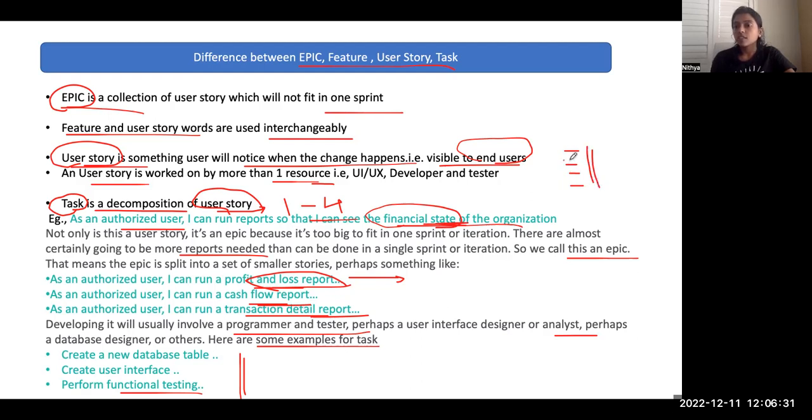We will discuss the lessons learned in the sprint retrospective meeting. Based on the priority of that unfinished story, we will again estimate the amount of time remaining to develop, and we will bring it from the product backlog to the sprint backlog, again decompose it into tasks, and assign the resource to perform each task.